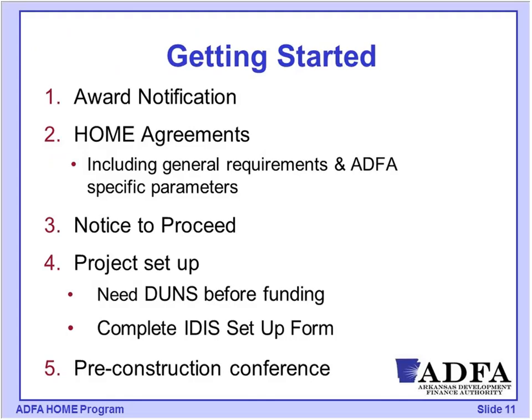So the initial process, at the point that ADFA makes their funding decisions, you would receive an award notification. This is not your grant agreement. This is a notification that you have been selected to receive an award of HOME funds. There may be some special conditions that would be a part of that award notification, maybe some things that you need to do prior to being able to finalize that agreement.